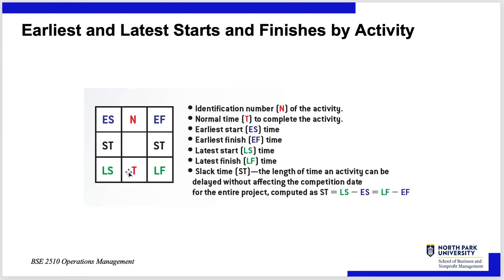One way of looking at each task node is a square containing: the activity letter or ID, the expected duration T, early start, early finish, late start, and late finish. If the activity is on a critical path, the early start equals the late start and the early finish equals the late finish. The slack time is the difference between late start and early start — or equivalently late finish minus early finish. Anything on a critical path will have zero slack time. This gives you a lot of information in a single node.